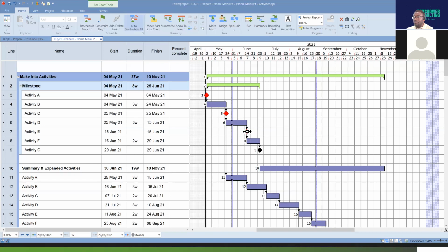But in terms of the successor, which is this one, it takes the previous dates, okay? It takes the previous date. So basically, when you have the 15, that becomes the 16. So it just is switched around between the finish milestone and the start milestone. Now, the start milestone, in practical terms, is used when you are indicating the start of a crucial stage of work or a project. And then the finish milestone is that milestone you use to depict the completion of a project or a crucial stage of work, okay? So that's basically what the difference is.